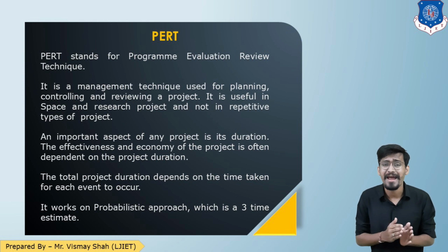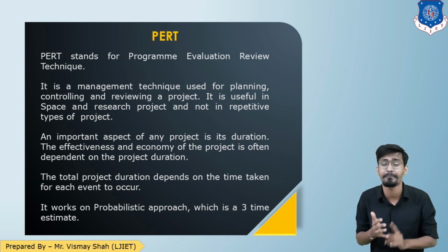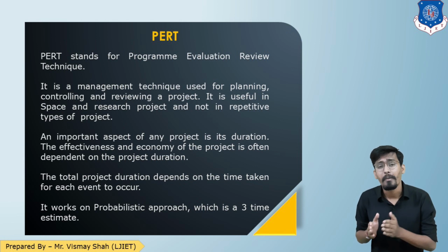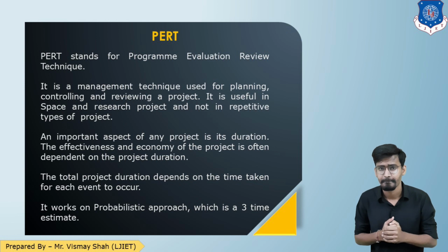Then the CPM method is applicable for repetitive kinds of projects, such as railways, bridges or industrial or factory buildings. While the PERT method is useful for non-repetitive kinds of projects such as research projects or space projects.